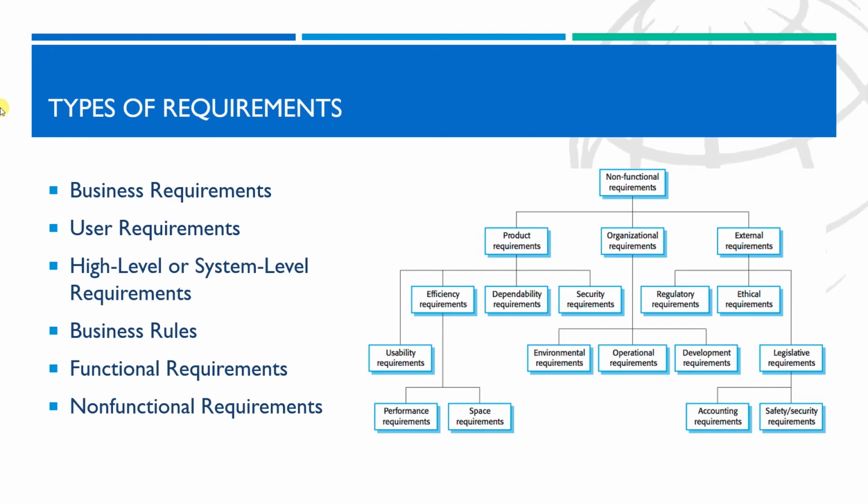The next are the business rules, which provide the basis for creating the functional requirements. They are as follows: the policies, conditions, and constraints of the business activities supported by the system; the decision processes, guidelines, and controls behind the functional requirements; the definitions used by the business; relationships and workflows in the business; and knowledge needed to perform actions.